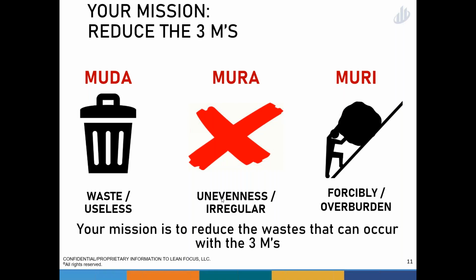So if we have one part of the program going really quickly, but then we have a critical path that is slowing that down, we need to have a balance in our resources and our project plan such that we're constantly aware of the critical path elements and doing everything we can to balance those elements against the rest of the execution of the program, and making sure our resource allocation aligns to really compressing that critical path as much as possible.